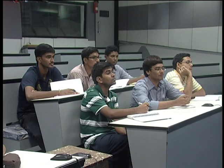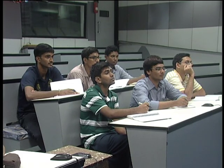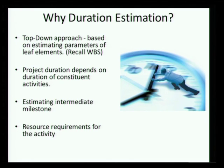Your planning will also be based on the durations of each of the activities to track progress. What we talk about is estimating intermediate milestones — we are not just interested in project duration, we are also interested in detailed milestones of progress. And only if we know duration at the activity level will we be able to control the project from the resource perspective: when to mobilize resources, when to demobilize, what kind of equipment is required at what stage, how much material to order.